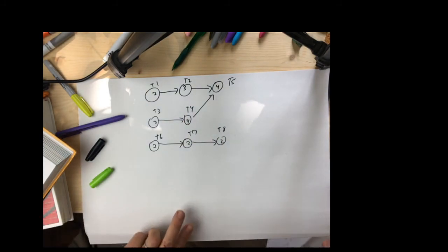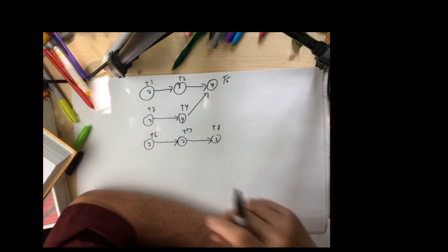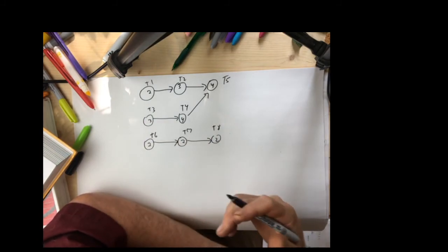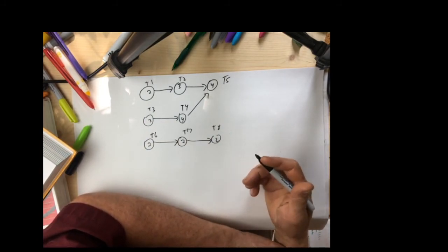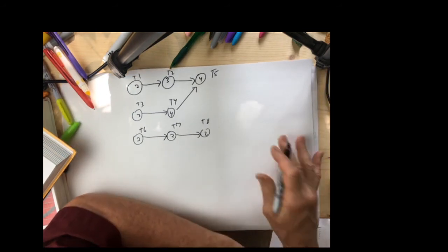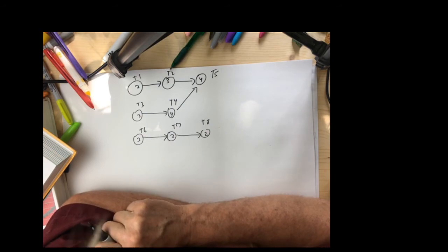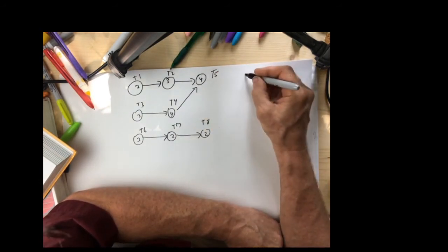And now I'm going to ask myself, why did that schedule have downtime that we got? Why didn't we apparently get an efficient solution? One of the reasons we can answer is we never considered the relationship that these dependencies have. These arrows say certain things have to be done. So I'm going to look at some paths.